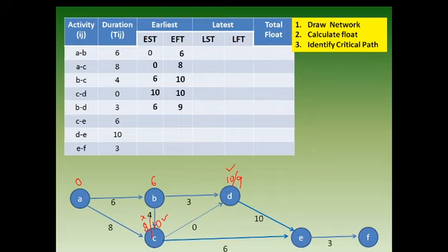Okay, so that's what I need to explain it over here. So for C activity we have 10. 10 plus 6, we will get it as 16. Okay, so here next is D to E. D value is 10. 10 plus 10, we get it as 20. Now which value will adopt? Greater value will adopt. 20. 20 plus 3, 23. So project completion time is how much? 23. This was nothing but forward pass calculation.